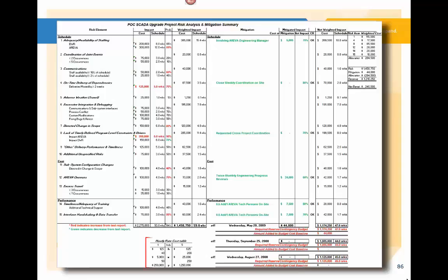And in this one, I've put in here the hourly rate cost table. I've moved it so it's in the picture so that the reader would have a sense of what I was looking at and what the basis is for some of these numbers. For instance, this is an hourly rate cost table, and we're saying that for one head, we're taking an average of $125 per hour, 40 hours a week, and then if there are 5 people, it's $625 an hour,